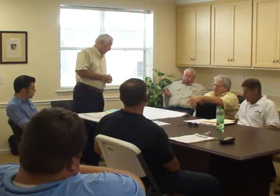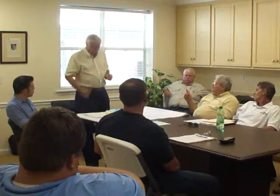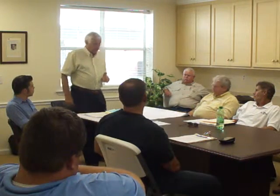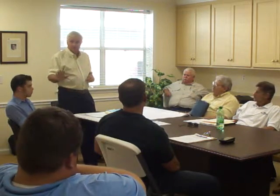On the Davis-Bacon thing, the general contractor will not have to make the component contractors keep their Davis-Bacon stuff up. If you're familiar with working on a federal project where you have Davis-Bacon, you have to submit a certified payroll. That includes all components. You have to comply with that wage scale, and you have to certify on a report every month that you've done that, and show and prove that you've done it.